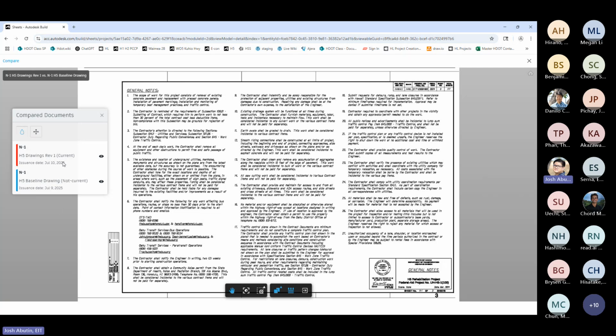For working as builds in sheets, some other module. Again, we're still working on the best practices for the as-built portion. Some people have requested making their own separate as-built project in ACC where they upload only their as-built drawings, and they bridge the two projects together, the as-built project and the main project, so that they are tied.